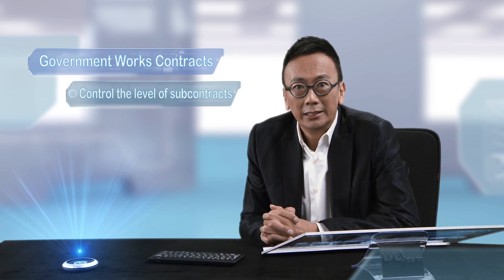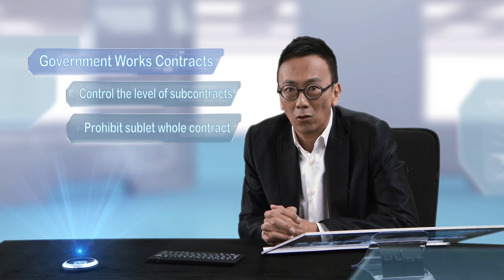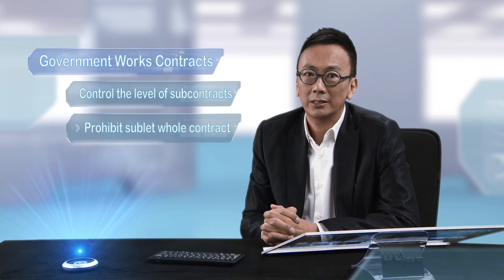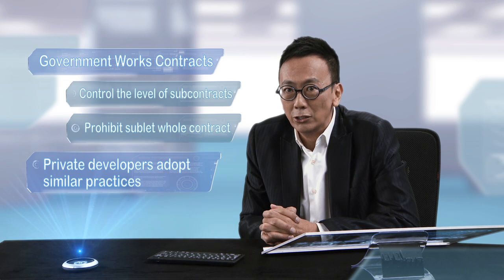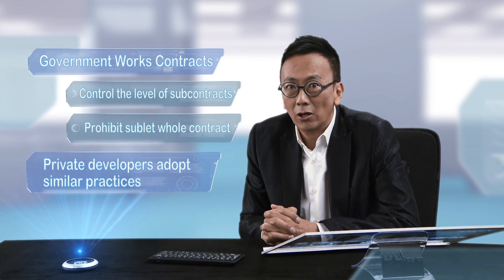We can see from the clip that with too many layers of subcontracting, the margin for the subcontractor is too low, forcing him to cut corners on fire services engineering and use substandard doors. To minimise the corruption risk of multi-layer subcontracting, the government has stipulated in its works contracts to control the layers and prohibit subcontracting of works to another company in whole. Private developers can also follow the practice adopted in public works contracts for better risk management.